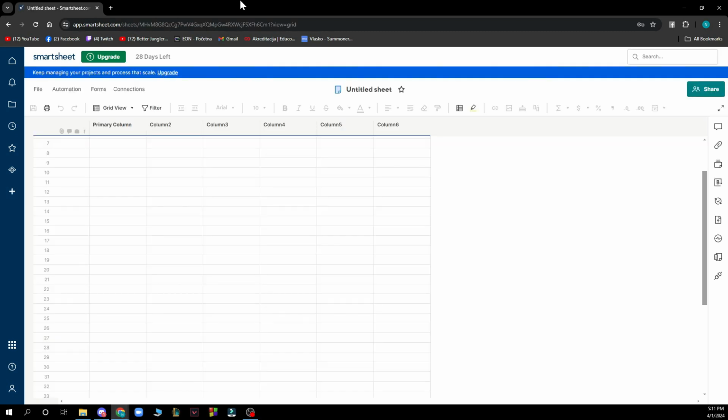Now let's see how you can actually find the critical path in Smartsheet. On the right of the screen, where your Gantt chart is displayed, which we also have a video on this channel for, click the far right button and display the critical path. Then on the Gantt chart, the tasks that are on the critical path will be outlined in red.